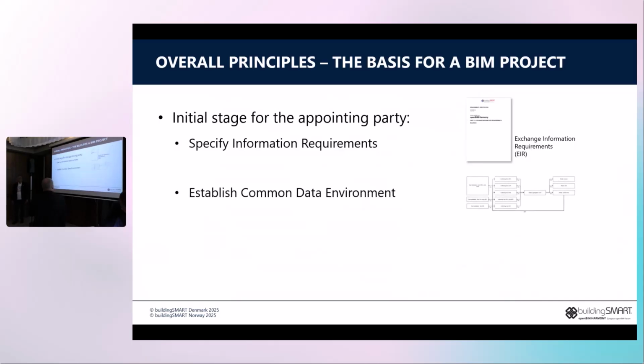Sorry. That's okay. So I'm just going to go through some of the overall principles in the content here. The client or the appointing party has a responsibility to specify their own requirements. As I said before, quite often they depend on the architects, engineers and contractors to do so, but it's actually their responsibility.